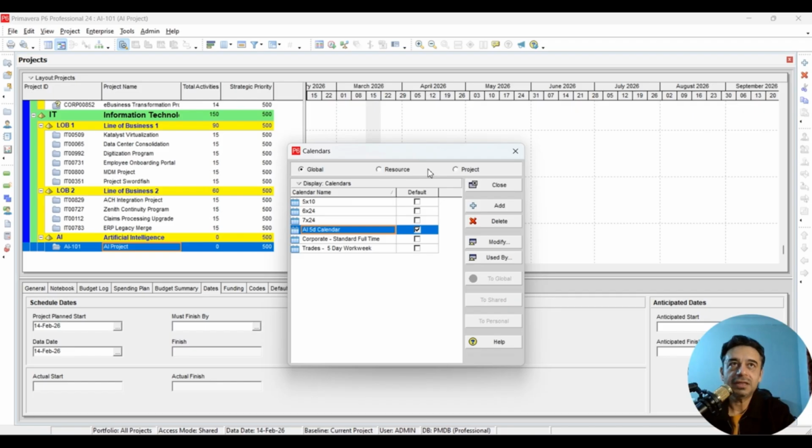Okay, the reason could be that, for example, you are working on a construction project and one of the resources you need is a machinery or a crane, for example. Now remember that for some activities the crane is the key resource, which means that if the crane is not available on site, you cannot do any other work.